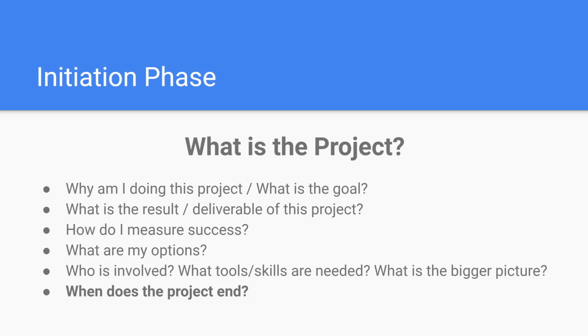And the main goal of this question is, when is the point that you invested too much into this project and you cannot finish, or you do not have any resources anymore to finish this project? So maybe you run out of money, maybe you run out of time. Not every project has to be ended successfully, but there has to be an end to a project. Either you have a successful deliverable or you have a failed deliverable. But really think about this question, because some projects you just drag on and then you don't work on other projects because you still have to finish this other project. Sometimes you just have to let a project end because you cannot finish it, or not finish it in a satisfying way.